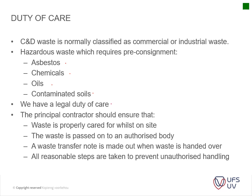You also have a legal duty of care. If you're going to work with asbestos, you risk exposing your laborers to it. Your personnel might not pick up asbestos on that specific site, but five years down the line they could get asbestosis and attribute it to that project. So you have a duty of care to look after your personnel's health. The principal contractor should ensure waste is properly cared for while on site, waste is passed to an authorized body, a waste transfer note is made out when waste is handed over, and all reasonable steps are taken to prevent unauthorized handling.